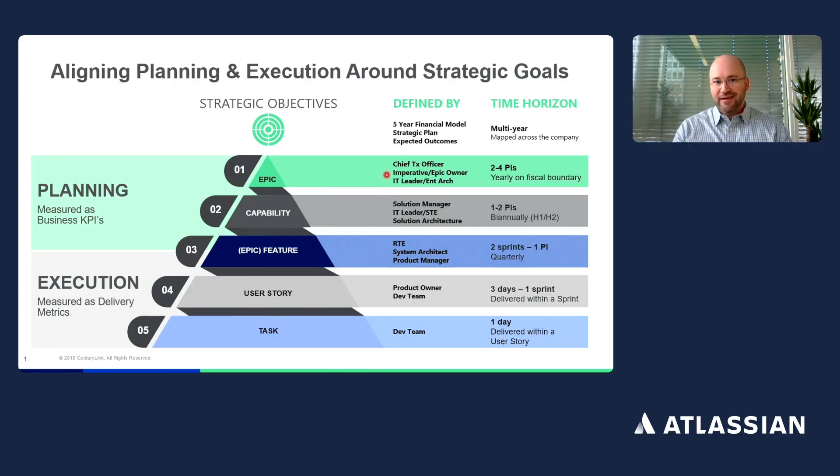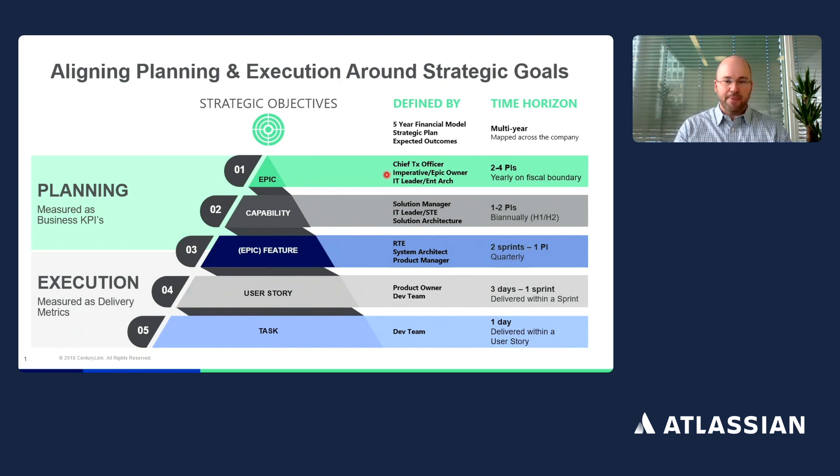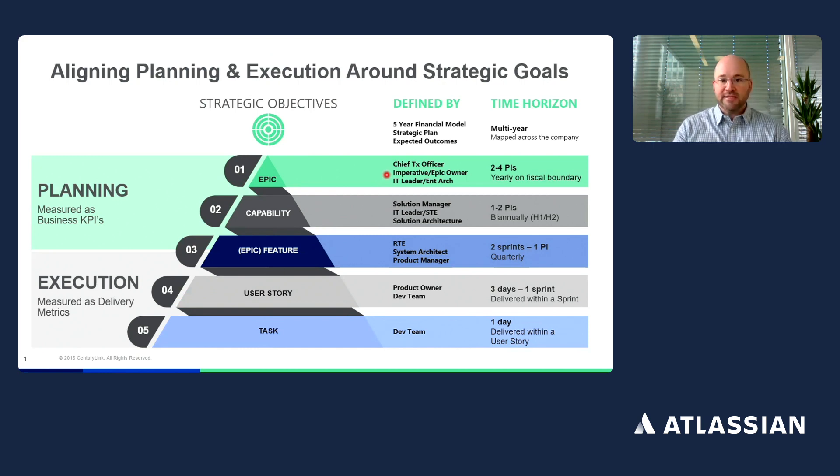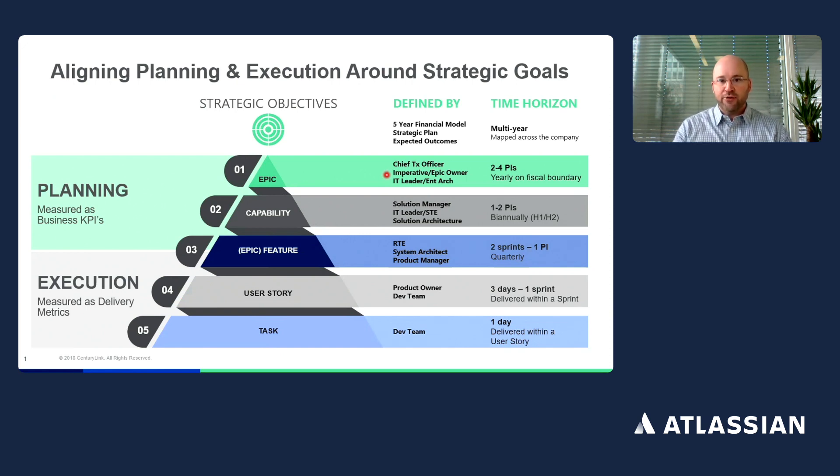Specifically at Lumen, we use a 90-day planning cadence period. This cadence allows us to meet on a quarterly basis to align around what is the value the teams will be delivering over that particular period of time.